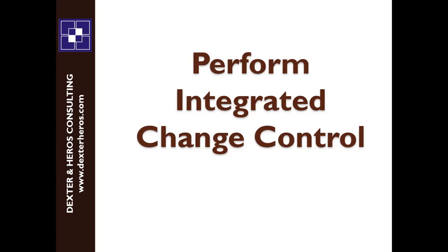You must officially write an official document. That's step two. You must officially write what we now call a change request. It is simply a memo you send to the sponsor, describing the changes you observe as work is ongoing, and you are seeking approval for the sponsor to go ahead and effect those changes.